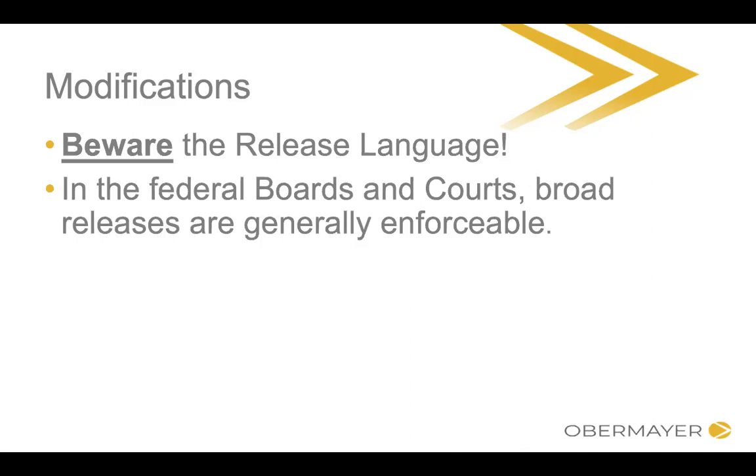I'm not even saying they do it on purpose. I'm not saying that they do it to trip you up. I think a lot of times it's standard language that they include because their supervisors tell them to include it on every mod. I think sometimes it's a cut and paste error that they forget to remove. But you need to be really on top of it and make sure you take a look, because if you sign away your rights, you signed away your rights. The boards and the Court of Federal Claims really don't like discounting waivers. They will hold these to be enforceable, and you will have limited your rights.